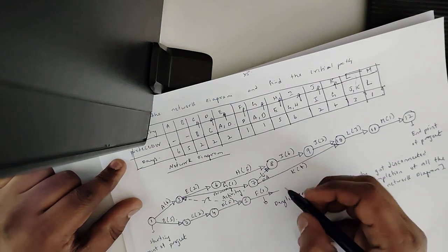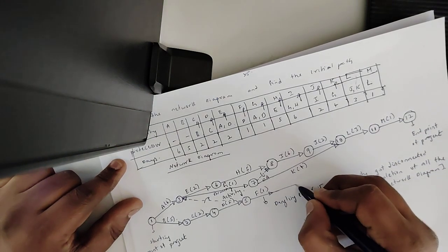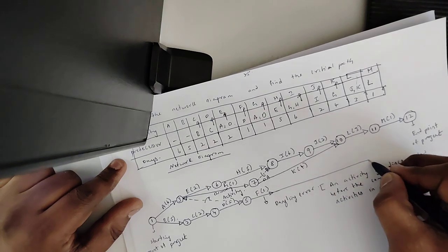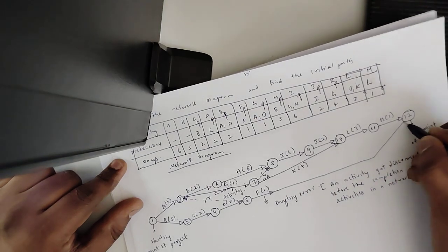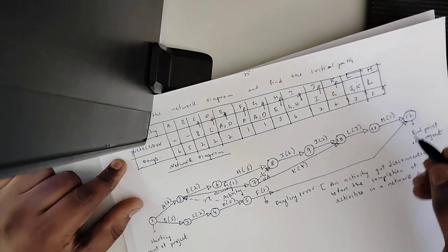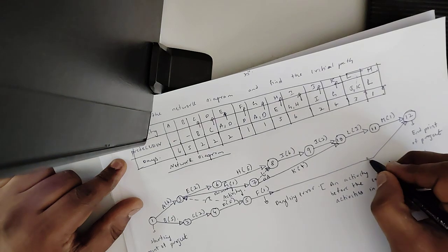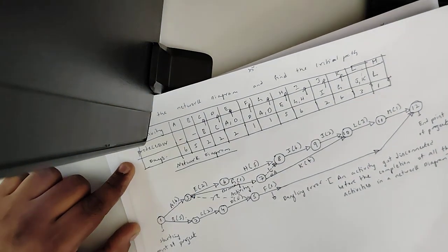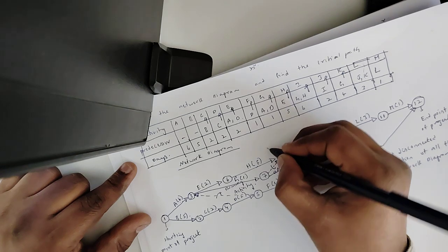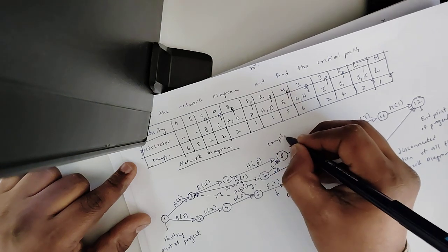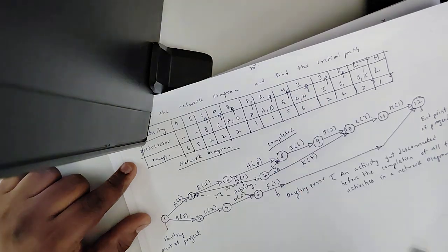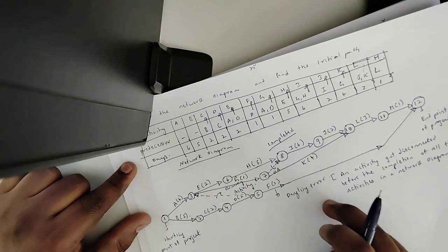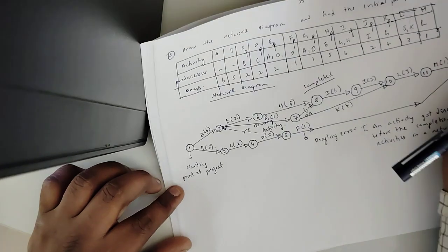Now what you should do to complete the network diagram, kindly show the arrow mark to 12th event to complete the network diagram. So now you can see the network diagram is completed. But this error is called dangling error, you should remember. Now we should find the critical path, students. Now we will find the critical path.